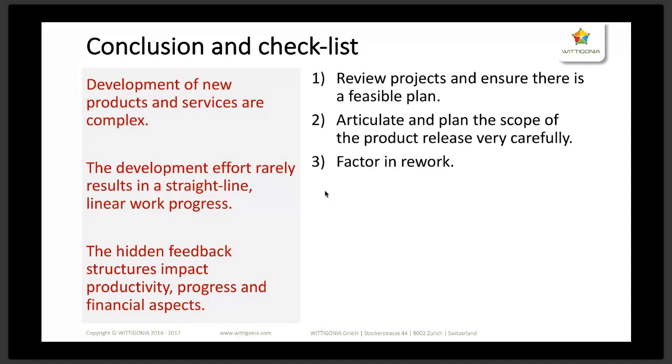Now, number 3, factor in rework. In pretty much 99% of the cases when I ask project managers or transformation leads what their assumption about rework is, they typically say, oh, we assume that everything is going all right because we know our stuff. That is rarely the case. And rework and the error fraction itself undergo dynamic changes throughout a project. For example, when you hire new staff, the new staff may have a higher error fraction than the existing staff, or vice versa. It really depends on the existing resourcing and skill levels of the organization.